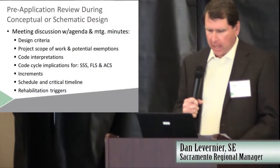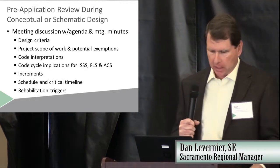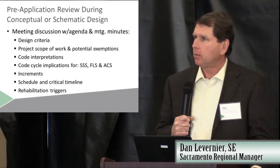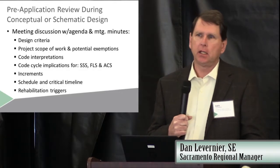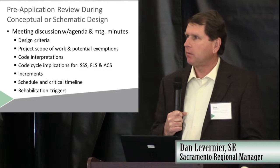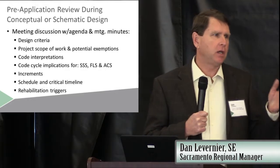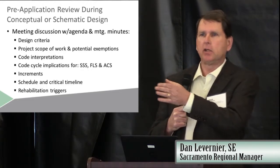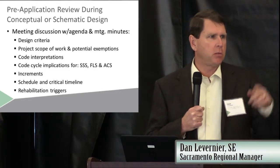Thanks, everyone. So at the preliminary meeting stage, during schematic design, in addition to code interpretations and potential code changes coming up that we can talk about, we'll also talk about your project schedule, and we'll try to do whatever we can to help you meet your schedule. If you've got an opening deadline or a funding deadline, it's real helpful to have this discussion when you're starting design, rather than submit the project to us and then say, oh yeah, by the way, we need it back by this date. At the preliminary stage, everyone's schedule can be adjusted somewhat.